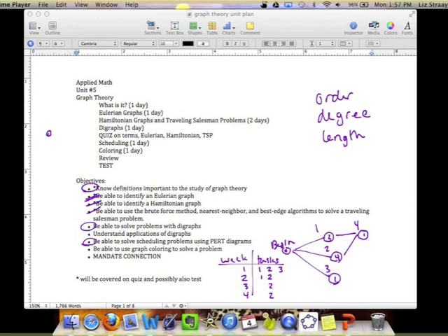Task 4 cannot begin until task 2 is done. So task 4 cannot begin until that 5th week because it needs tasks 1 and 2 to be done. And we would continue on out and see by the time everything is done, how many weeks did our schedule take us.